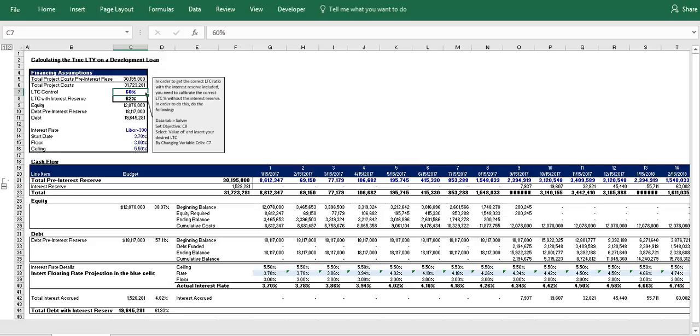Okay, so as mentioned in the post, it's really tricky at first thought to build a model that will calculate the interest reserve off the initial budget, add it back to the budget, and then reallocate the total budget so that total costs are properly split among debt and equity. So to further elaborate on this point, by adding the interest reserve back to the budget, you're actually changing the budget that the interest reserve was created from in the first place.